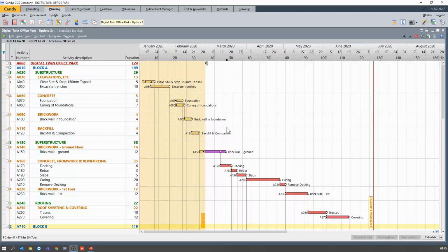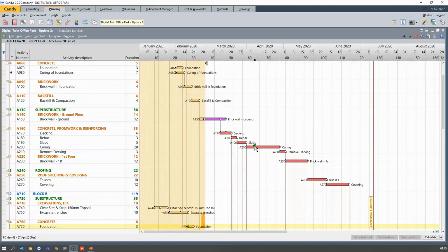Okay, so the first option is to look at the remaining activities and see which of these activities can run parallel to each other. Basically a start-to-start relationship. So that's one way of looking at it. The second way is looking at the duration. Maybe increase the manpower. But by increasing the manpower, yes, you will reduce your duration, but there will be cost implications by doing that.